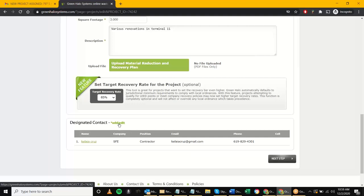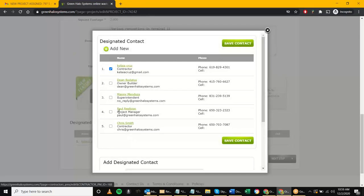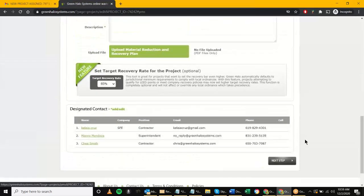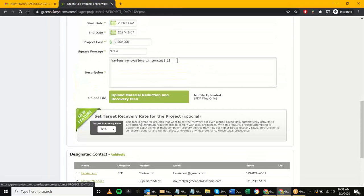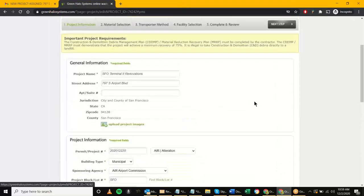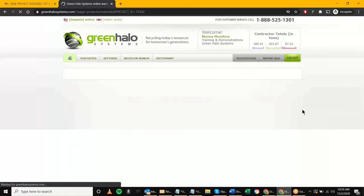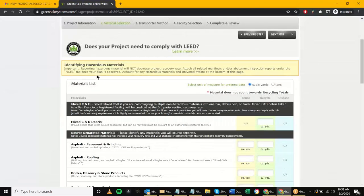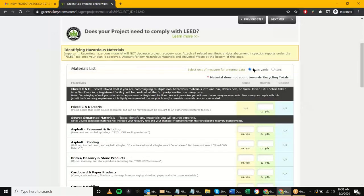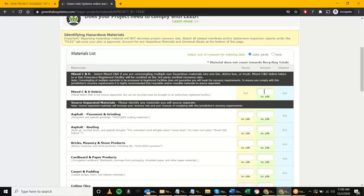Moving on to the next step: identifying materials. There's a helpful message about identifying hazardous materials. I can enter or identify what type of materials I'm going to be generating. In this case, I could choose cubic yards or tons — cubic yards tends to be a little easier. For an airport project, say a 20 cubic yard container is dedicated to this project and it's 52 weeks — so 52 times 20 gives about 1,000 cubic yards.